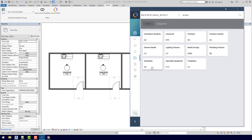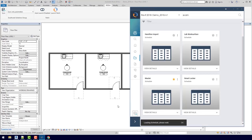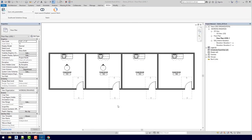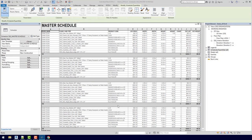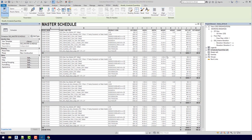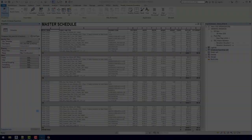I can come down here to the master schedule and insert that. What the master schedule actually does is it takes all of our content, puts it in a nice schedule no matter what kind of content it is, gives you a product code, gives you a price and some dimensions, and then groups it all by room. Since we put the same model group in every single room, we can see that we're getting the same price in each room, and if we go down to the bottom, it actually is totaling up all of our rooms. Just by adding those model groups and loading in the schedule, now we already have a budget for all of our casework.